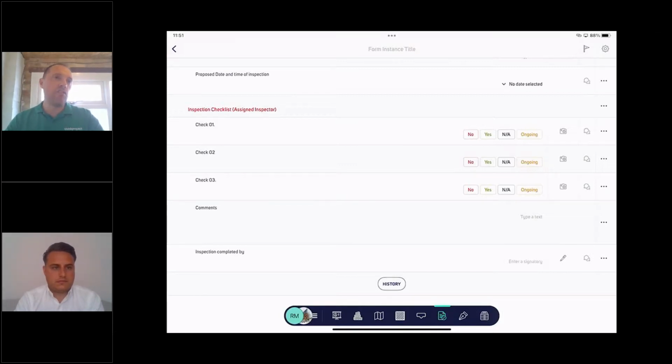And if we then get actions required off the back of those, say we get a control point that fails, you can then trigger, we call it an observation, an actionable process off the back of that. So it might be a defect, you might call it non-conformance, you might call it action, whatever you want to call it, but you can trigger actions in relation to that control point on your ITP. And obviously we allow you to report around that, and we allow you to track all that information.